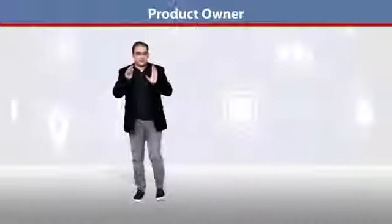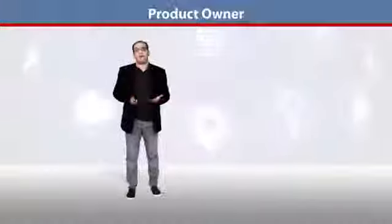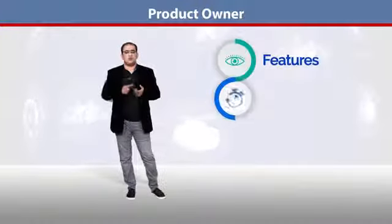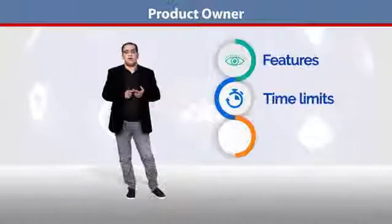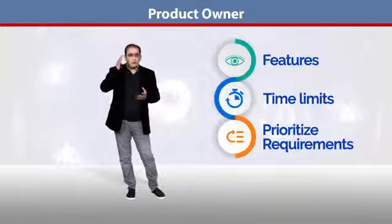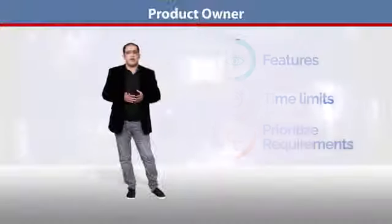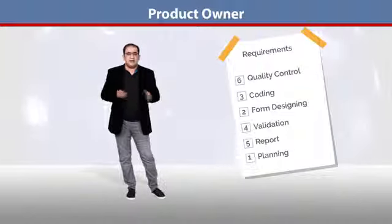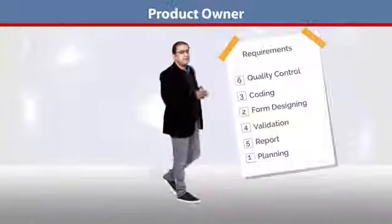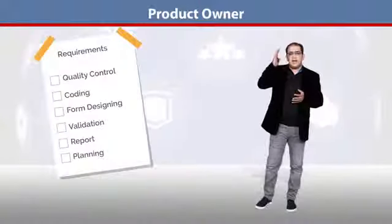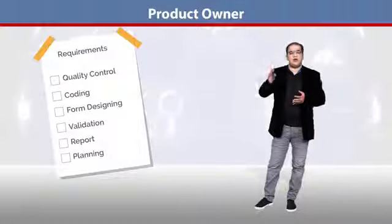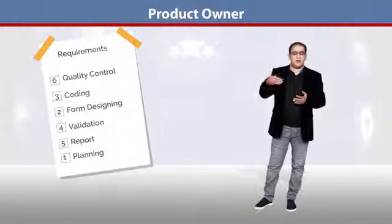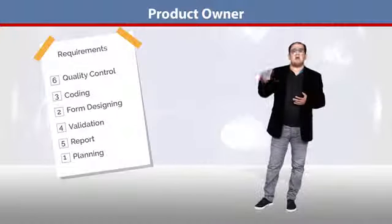The Product Owner tells you which feature, which requirement, is prioritized. For example, if the Product Owner has 6 requirements, the team cannot start all 6 simultaneously. So basically the Product Owner decides which requirement is most important — numbering them by priority — so when development starts, the highest priority requirement is addressed first.